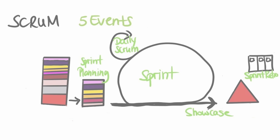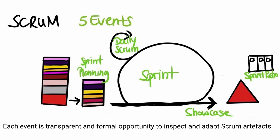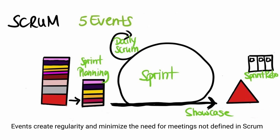Scrum Events. There are five events in Scrum. The first is the Sprint, which is a container for all the other events. Each event is a formal opportunity to inspect and adapt Scrum artefacts, specifically designed to enable the transparency required. Events are used in Scrum to create regularity and to minimise the need for meetings not defined in Scrum, and should not be seen as additional meetings to overload the team. Optimally, all events are held at the same time and place to reduce complexity.